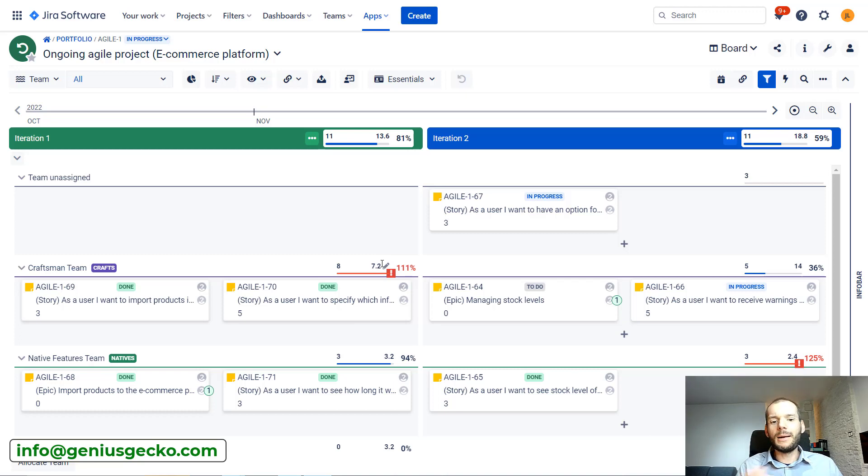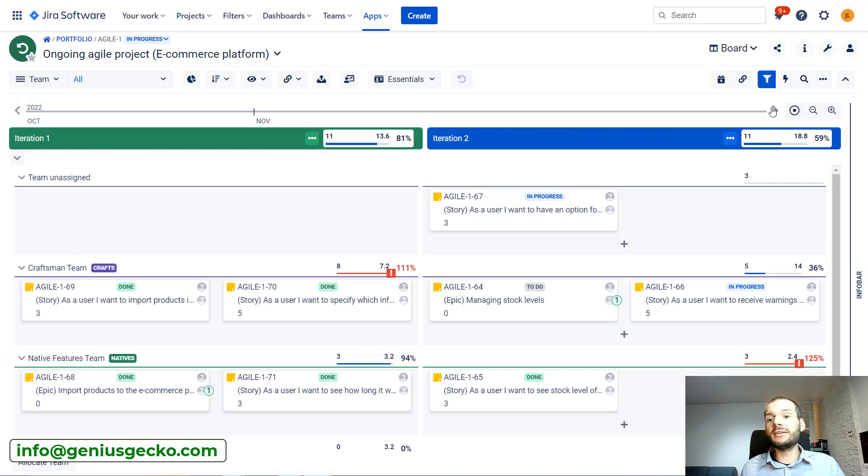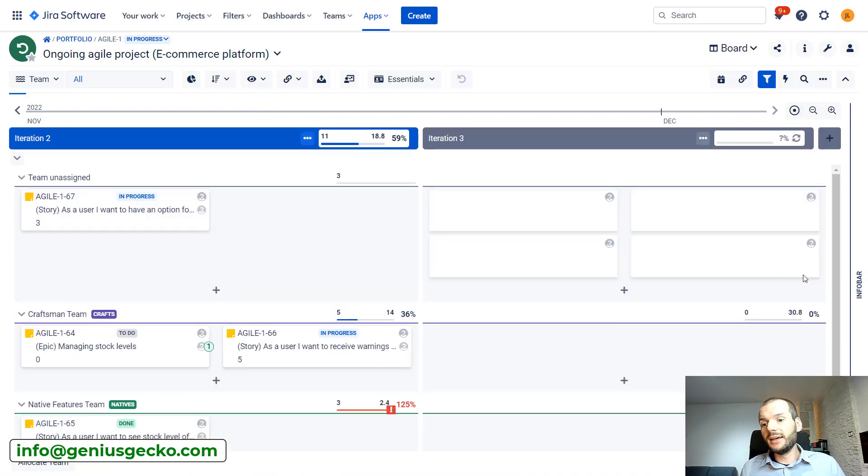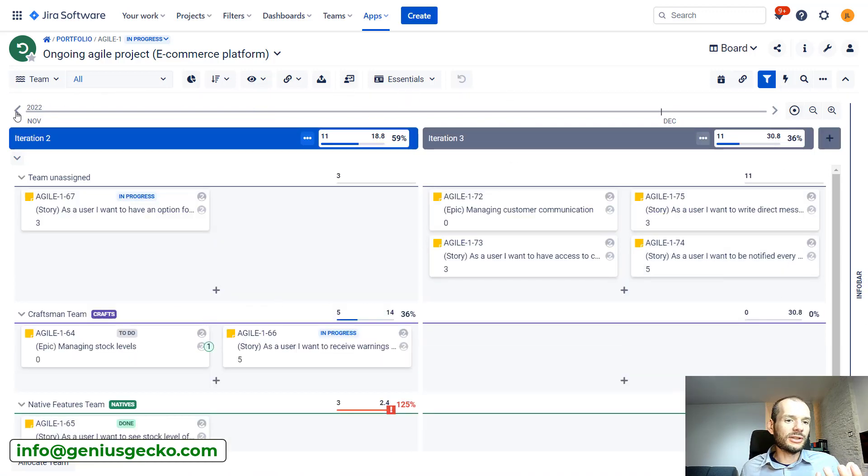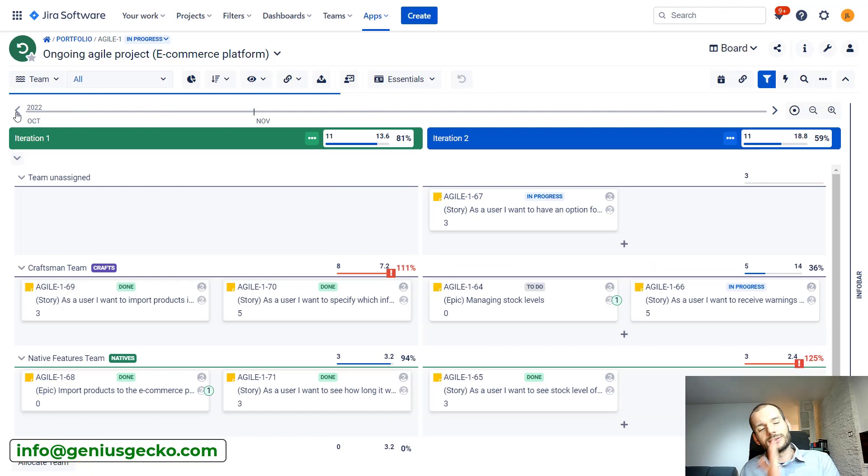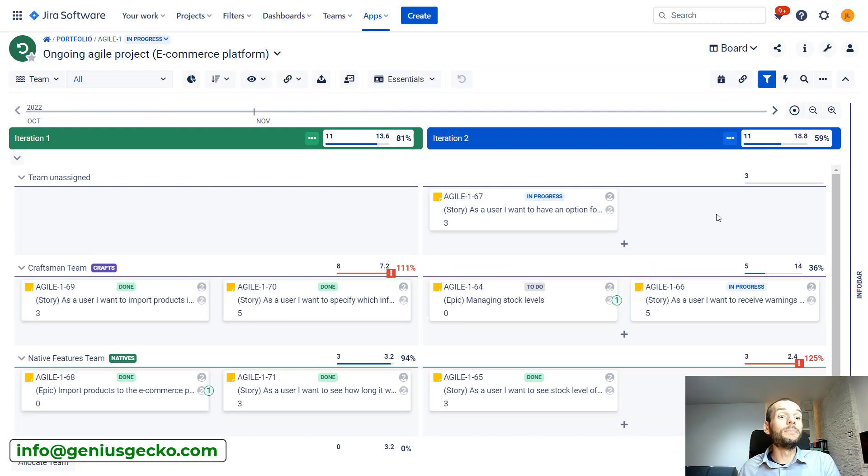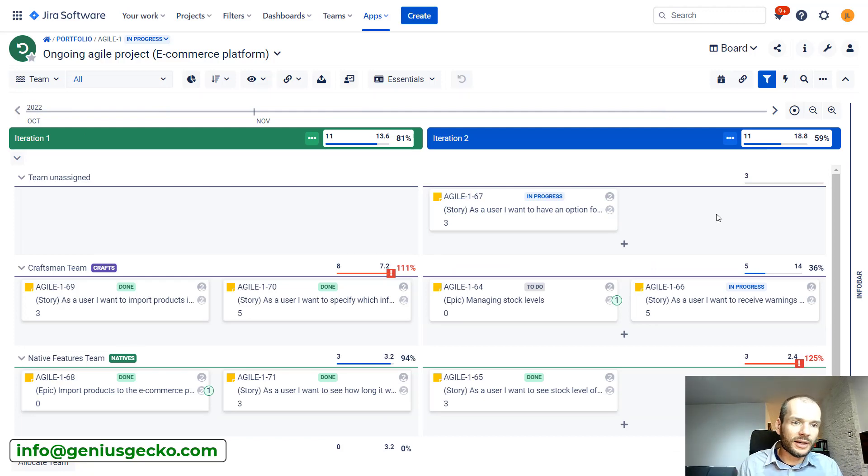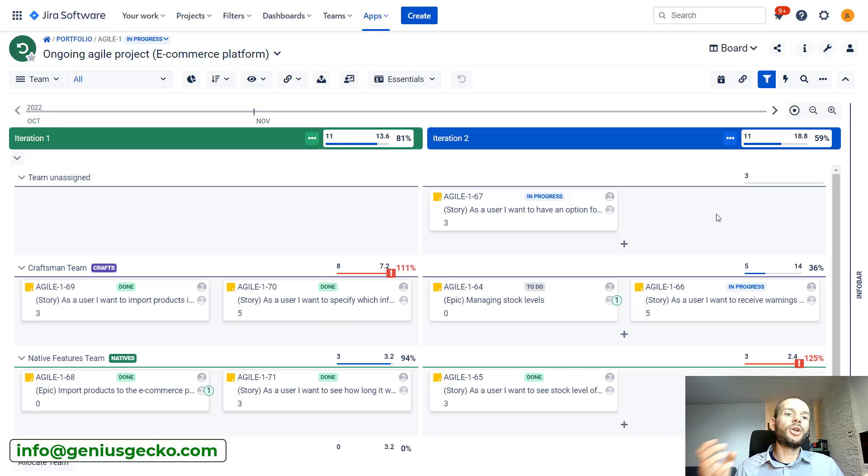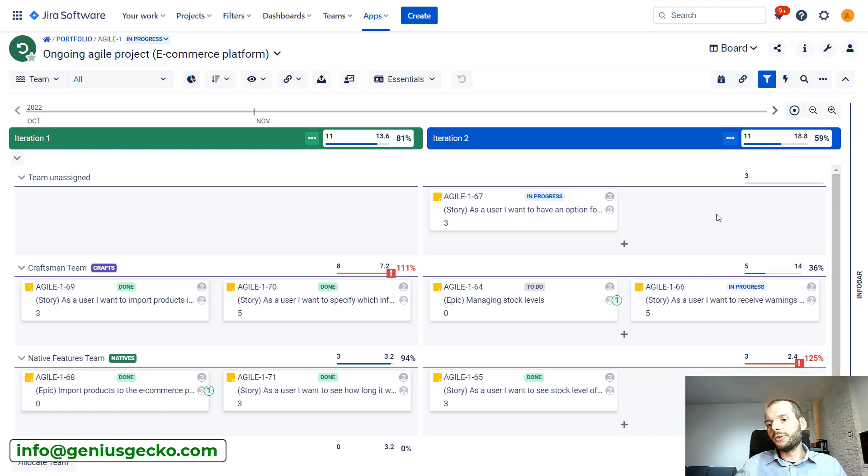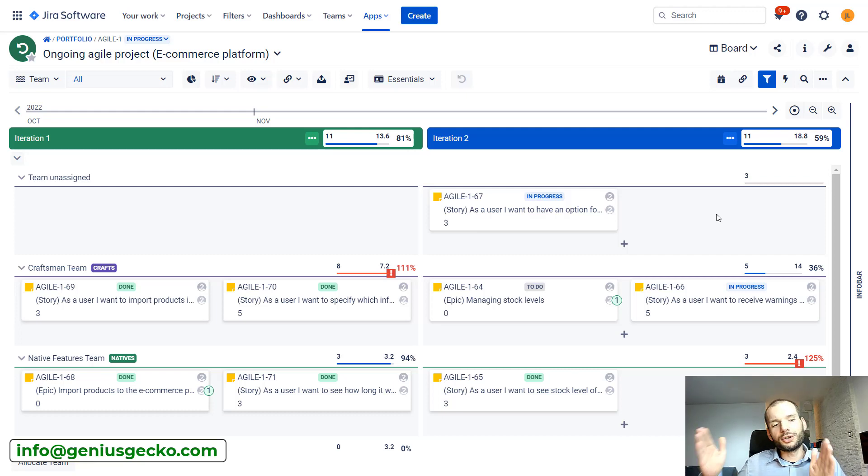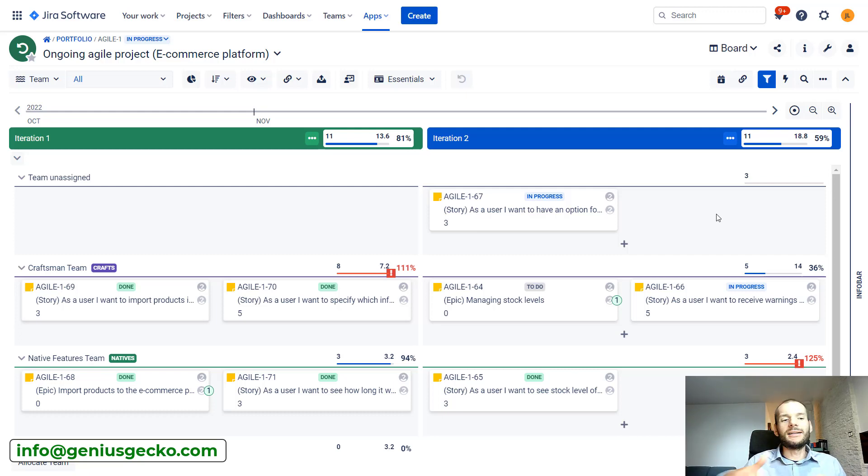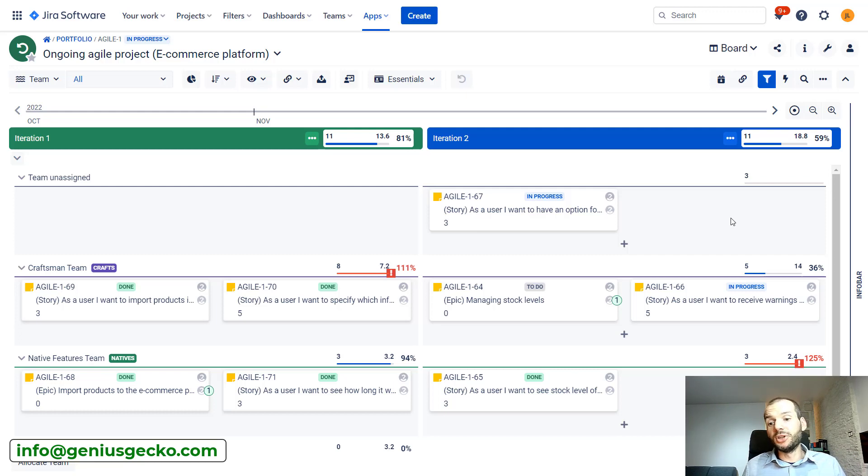If a person leaves the team, the capacity changes. Basically, the number, for example, in the next sprint can be different than the previous one. Because, for example, at a certain point in time, a person leaves the team. The same happens if a person is on holiday. So if we have a five-member team and two of the members are on holiday, are not working for the whole sprint, basically 40% of capacity will be decreased.